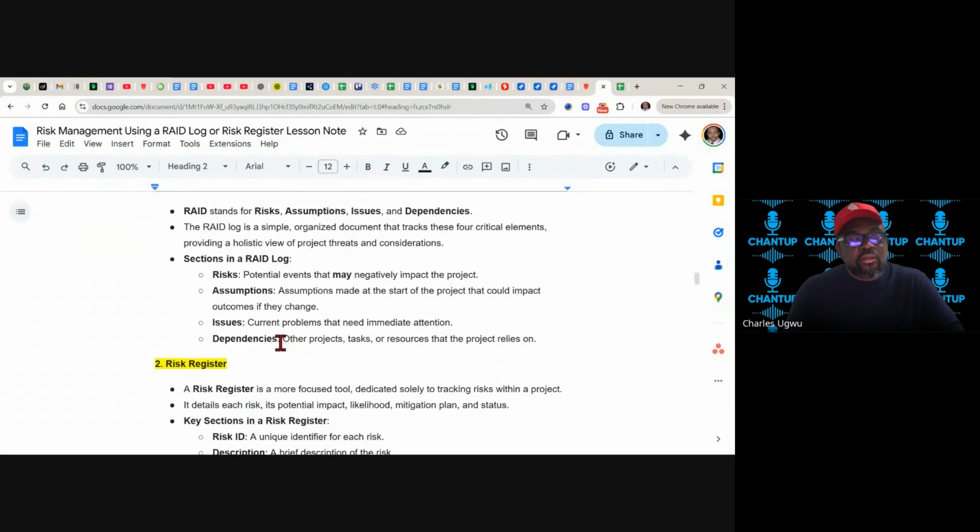The business case needs to be approved before we can start drafting our project charter, because we need to agree on a solution to implement before it becomes a project. So it means that the project charter is depending on the outcome of the business case. If the business case is delayed, it means the project charter document is going to be delayed as well. So these are dependencies.